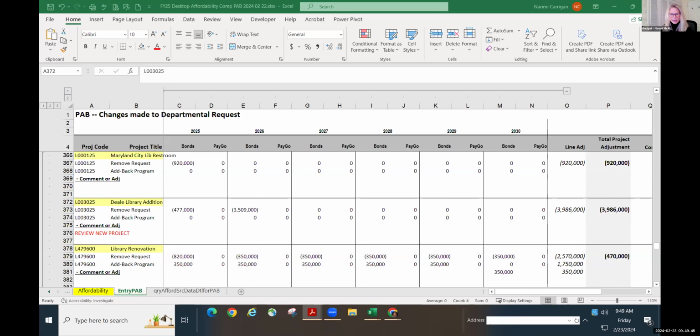My notes only say something about a South County Community Center already in existence, I don't know, my handwriting's like chicken scratch on this one. Do you want to leave it for now? I'm inclined to leave it in for now, because that's a smaller chunk than a whole new library. If we have to support some but not all, then I think that has a small pushback. It's 4,000 square feet at $4 million, $1,000 a square foot.